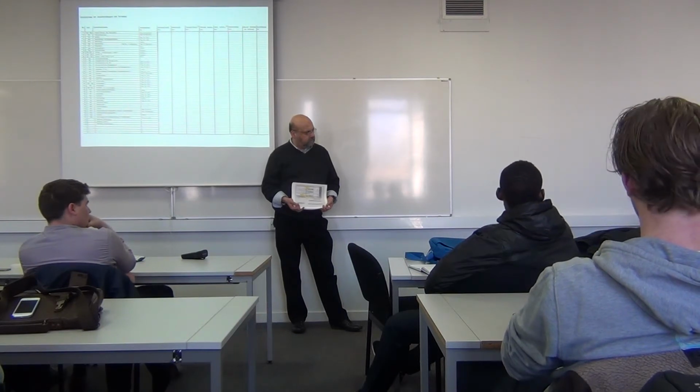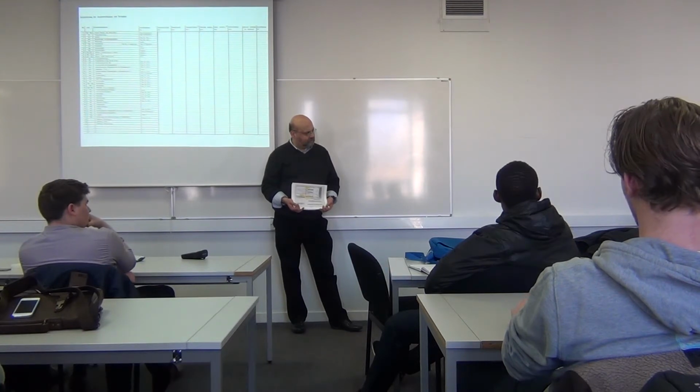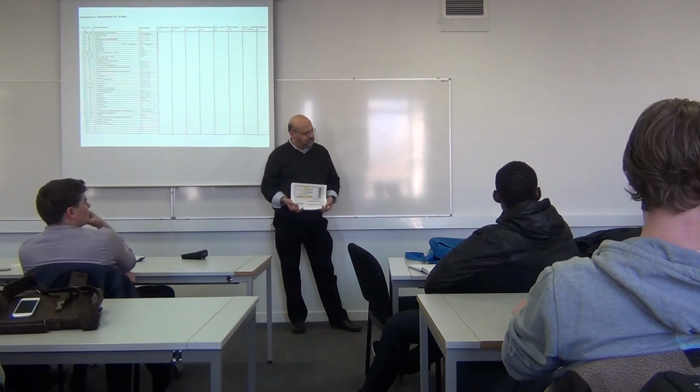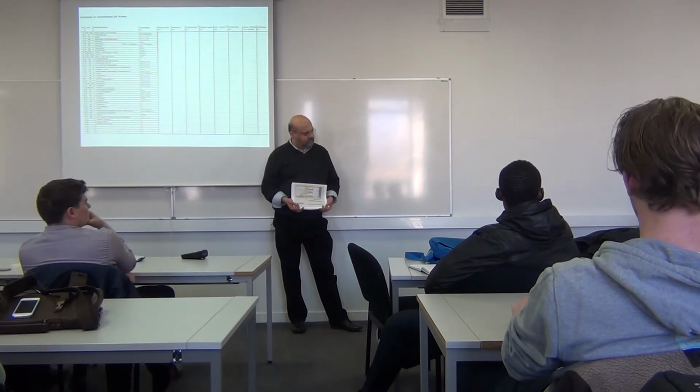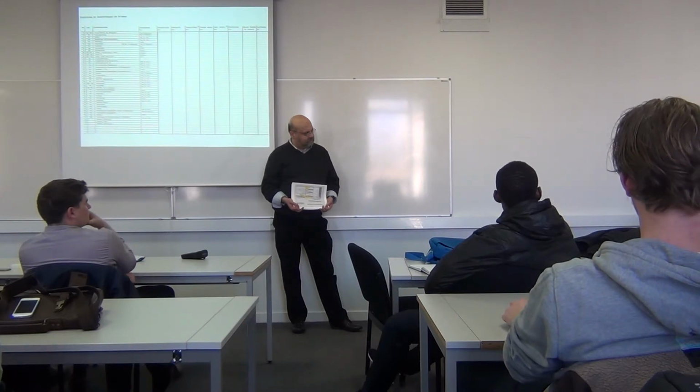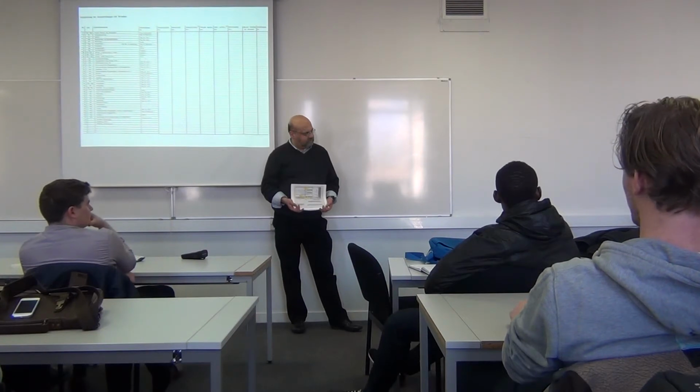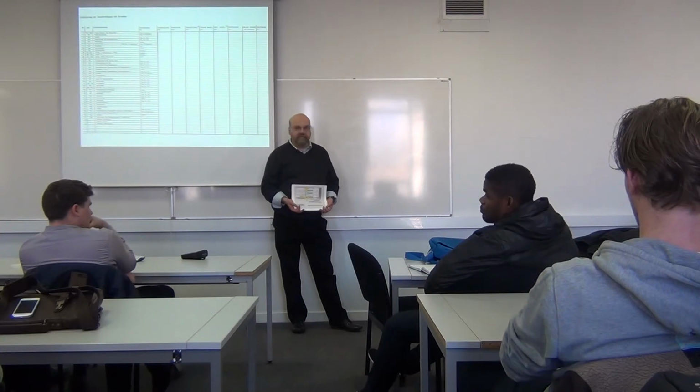Yeah? And this is in the definition where you really define who is doing what work, and this is where this feasibility planning is translated into actual planning. This is as well when you have to go back to the client potentially to assure, if a change is agreed later on particular positions, that this is actually accommodated in that specific planning to actually do the construction.